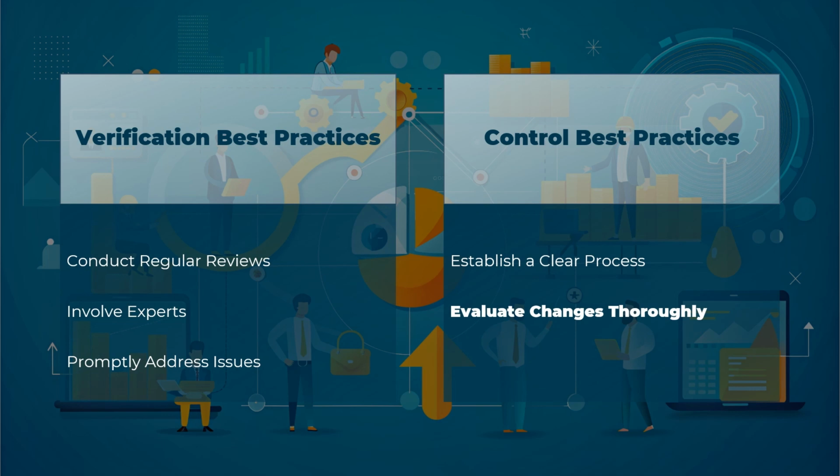Thoroughly evaluating changes before approval is another best practice. This involves conducting detailed impact, feasibility, and risk analyses for each proposed change. A thorough evaluation ensures that only beneficial and feasible changes are approved, preventing unnecessary disruptions to the project.